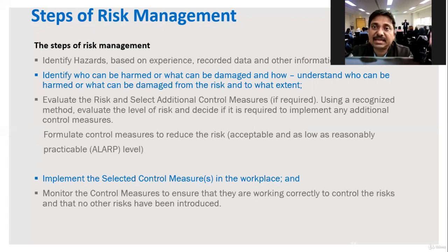Evaluate the risk and select additional control measures if required. Using a recognized method, evaluate the level of risk and decide if it is required to implement any additional control measures. Formulate control measures to reduce the risk.